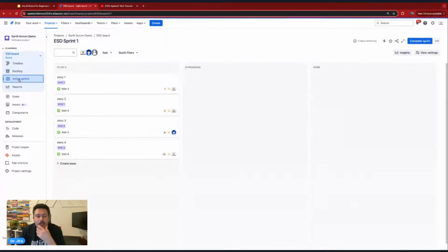And then we have an active sprint. The active sprint is basically the board. This is what we traditionally know as a board, right? This is where we can visualize the stories, the tasks, the bugs and subtasks. Not epics though. No epics in your Scrum board. Kanban though, man, this thing gets really complicated real fast. But Kanban will let you see epics. Scrum is usually stories down. Okay. And we'll come back and talk about how this all works in a second.